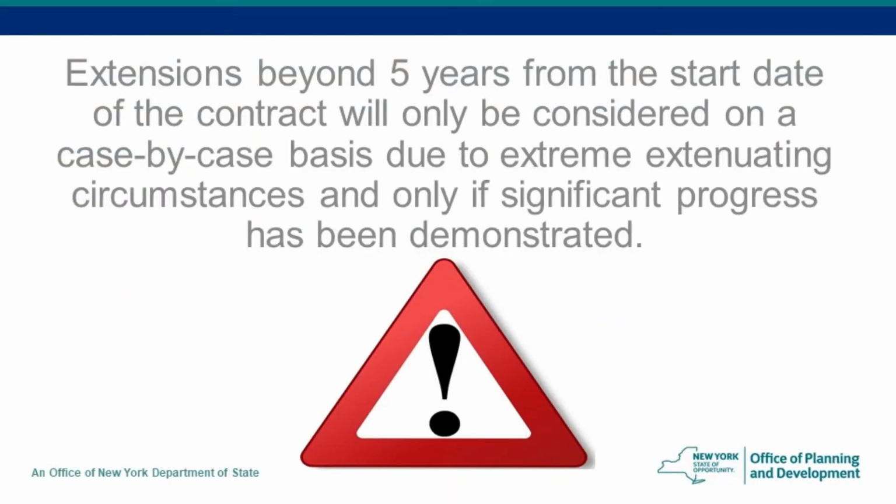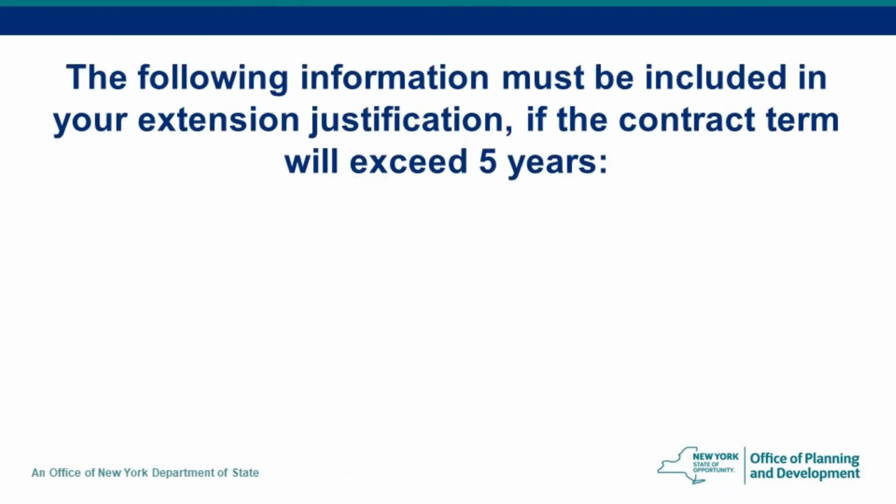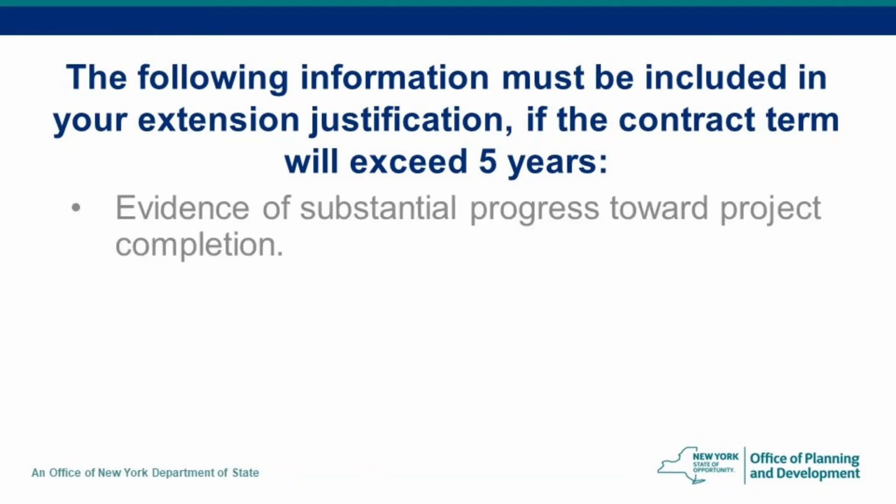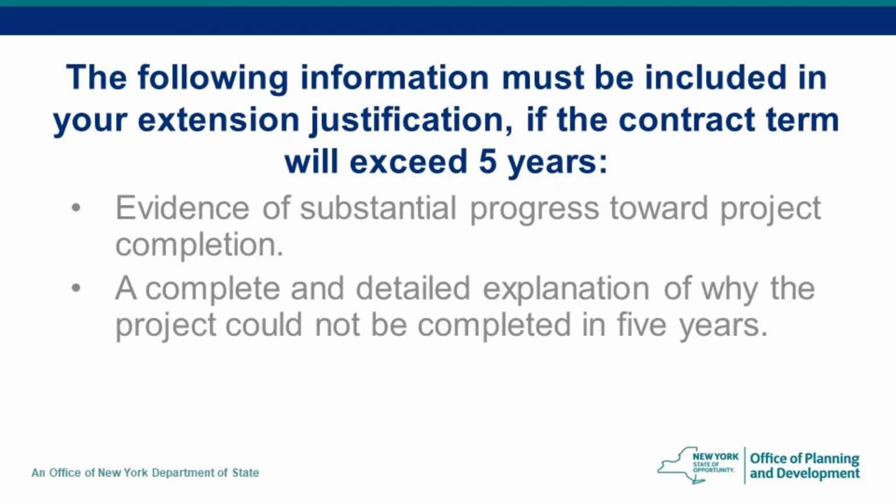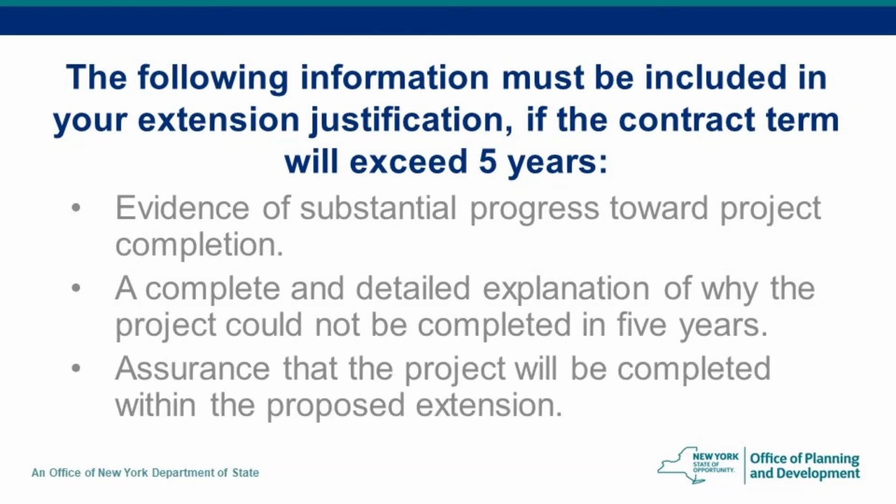Extensions beyond 5 years from the start date of the contract will only be considered on a case-by-case basis due to extreme extenuating circumstances, and only if significant progress has been demonstrated. The following information must be included in your extension justification: evidence of substantial progress toward project completion, a complete and detailed explanation of why the project could not be completed in 5 years,